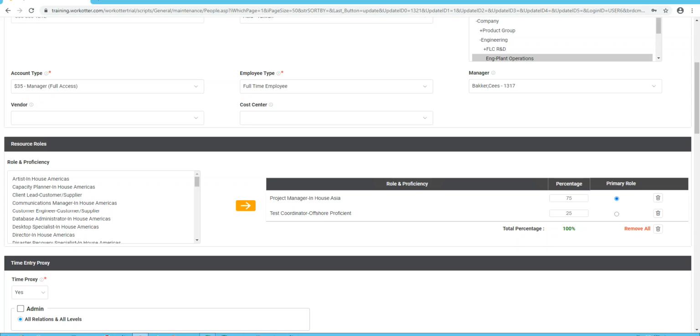One way to use a proficiency is if you have a stovepiped organization. Let's say you have a group of project managers that report to organization A and a group of project managers that report to organization B. Well, when you tag that role, you need to know which group you're pulling from. So we add a proficiency and we split the row. So there's project management dash org A and project management dash org B. And our reporting is sophisticated enough that you can just remove the org A or org B and just say, do I have enough project managers? Full stop. So one of the ways you use the proficiency is to help with that stovepiping situation where not everybody's co-located under one manager.